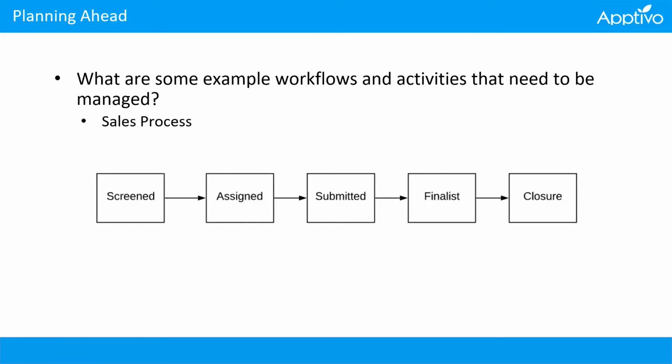Oh, and I'm sorry, I should have explained this already, but an RFP is a request for proposal. So in engineering companies, quite often, the client will reach out to a bunch of vendors and say, hey, I need to build this project. And then quite a few vendors, usually a minimum of 5 vendors, will submit some kind of a proposal, and then the client will choose from them. So that's sort of the process that we're going to be walking through here.